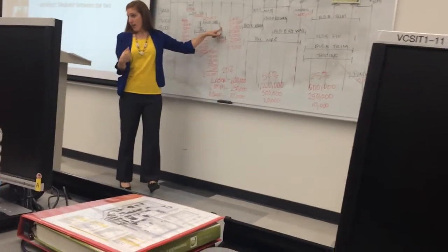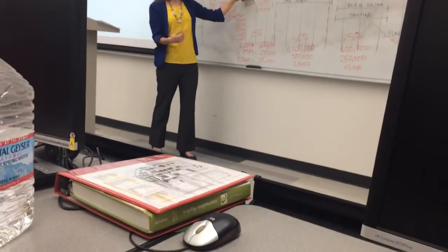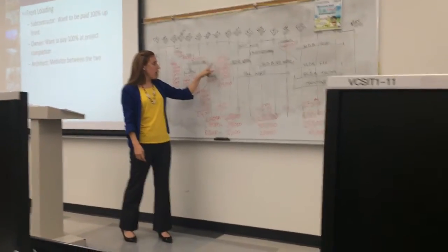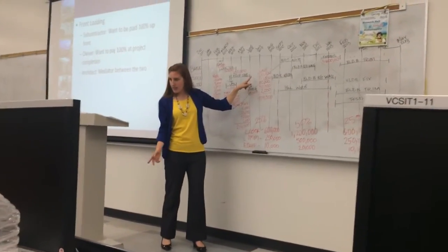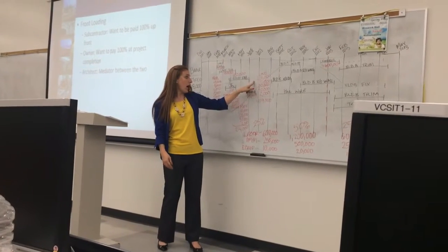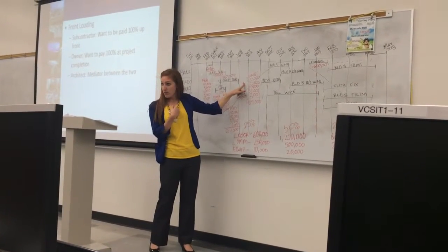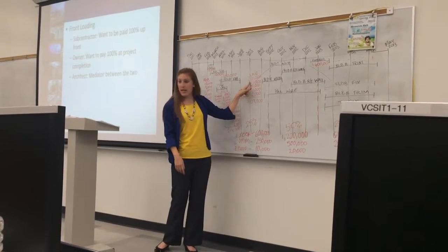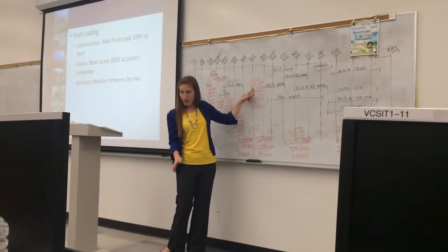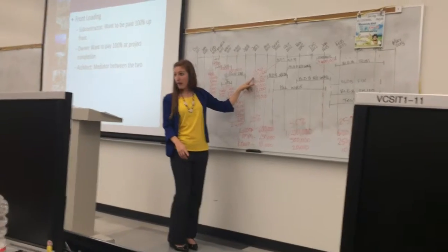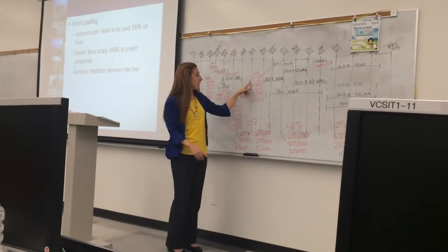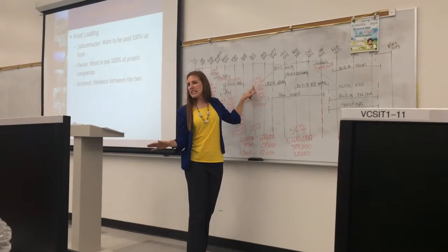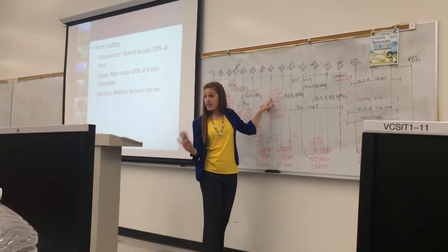If you price it lump sum, and your guys have started working, one week, 15 days, 10 days, I get the change order in. Then it takes them another 10 to 15 days to process and approve it. All the while, I'm still expending costs. We get to 15 days later, they decide they don't really like it, they want to negotiate it, because they have that right.